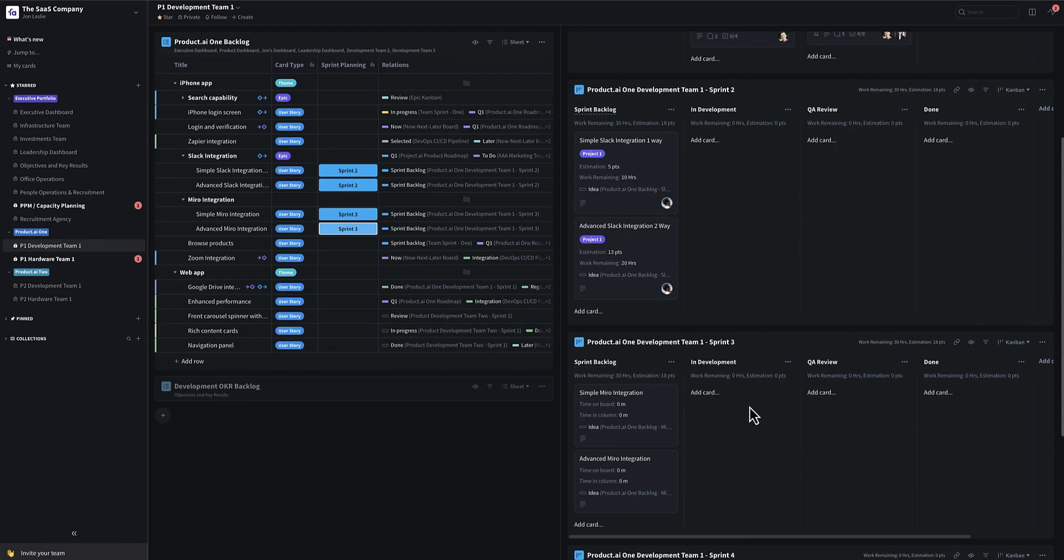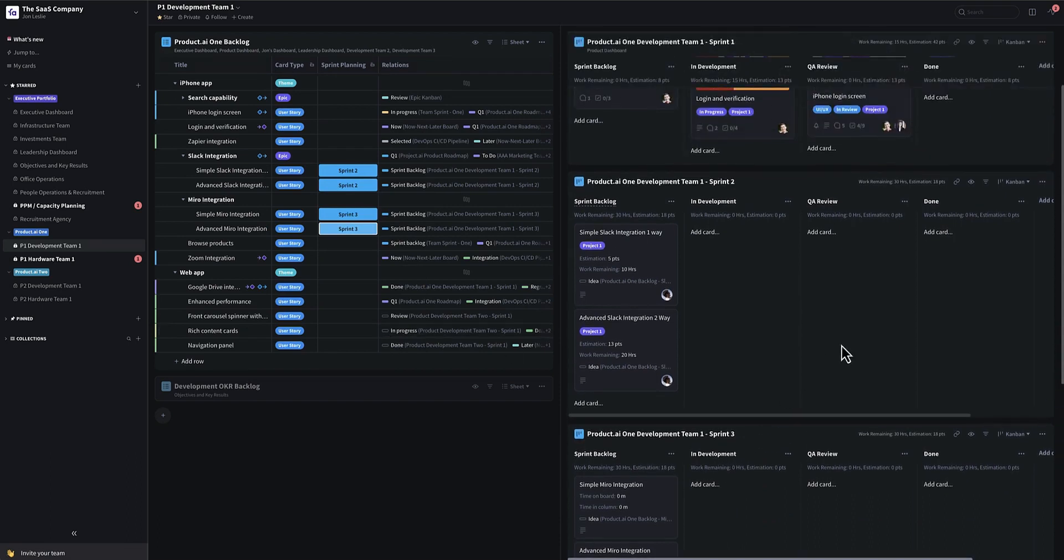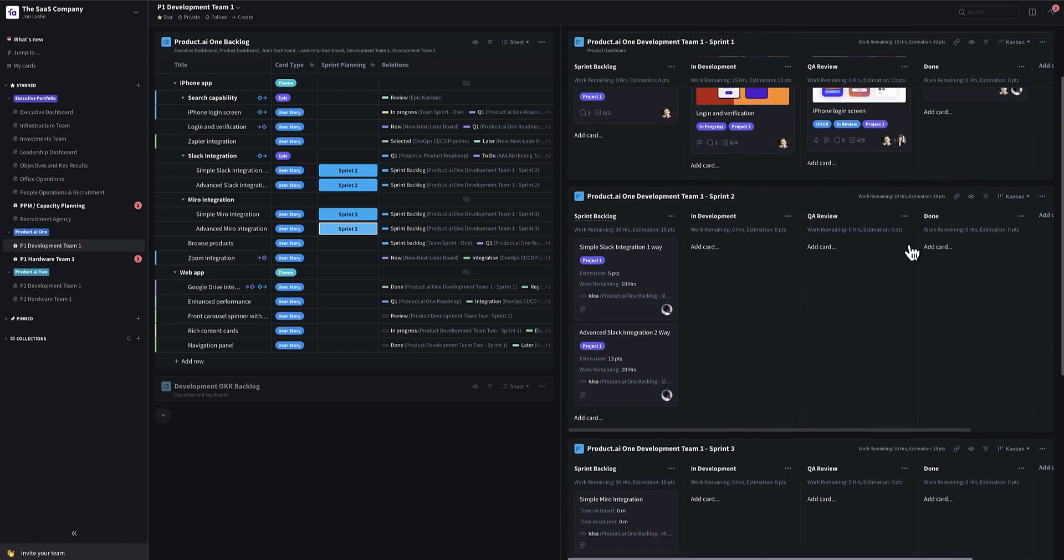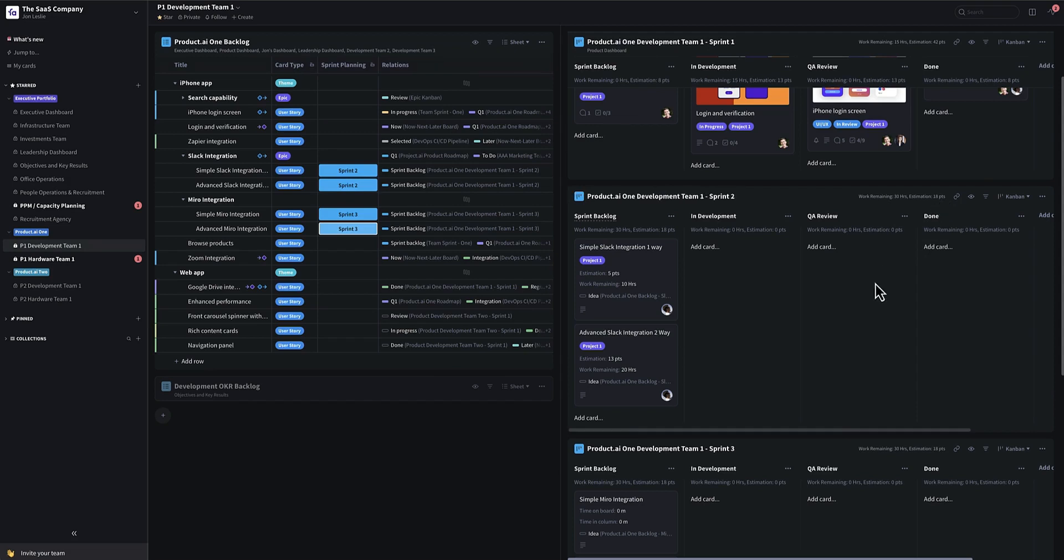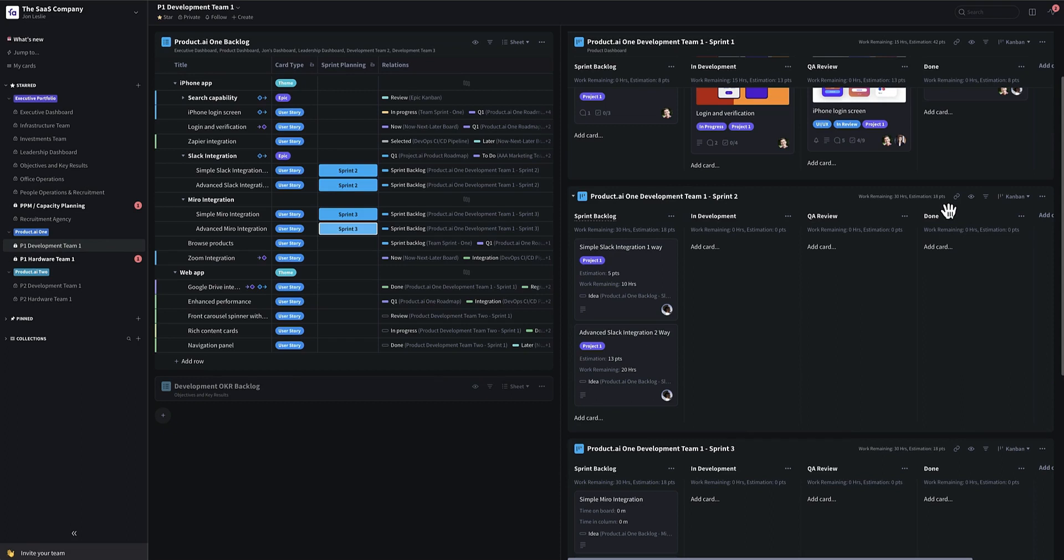So say we know that our velocity, our historic velocity of the past three sprints is maybe 30 points or 50 points, whatever it happens to be. To do some nice sprint look ahead planning to see if things fit out into the future, you can just essentially keep adding work in priority based order to your sprints using the method I'm showing you now until you hit 50 points or a little bit under 50 points for each one of these sprints as it continues to roll up. So it's a nice way to do some look ahead planning in an agile environment.